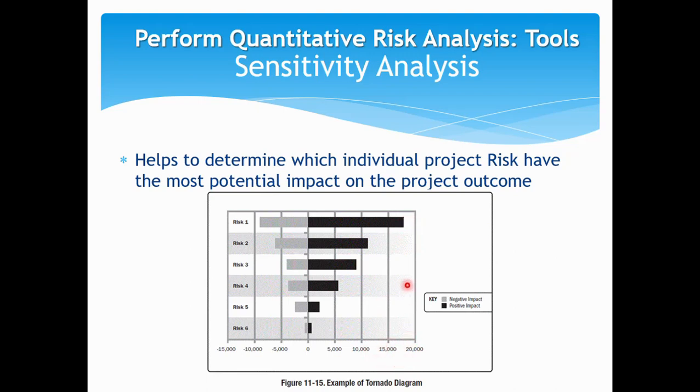So there can be a cost involved. If the goods come early in October, then since you're anyway paying them, you can quickly do the database administrative jobs and release them from the project. So there can be a cost saving to the project on this side. Likewise, in each risk, you can have the most probable scenario, the most optimistic scenario and the worst case scenario, and give a monetary value.